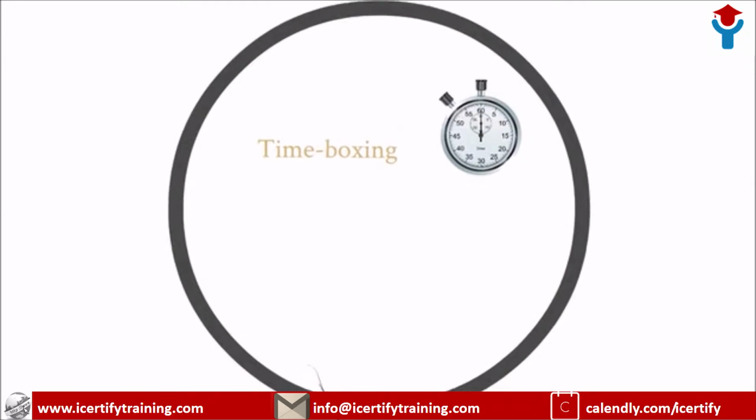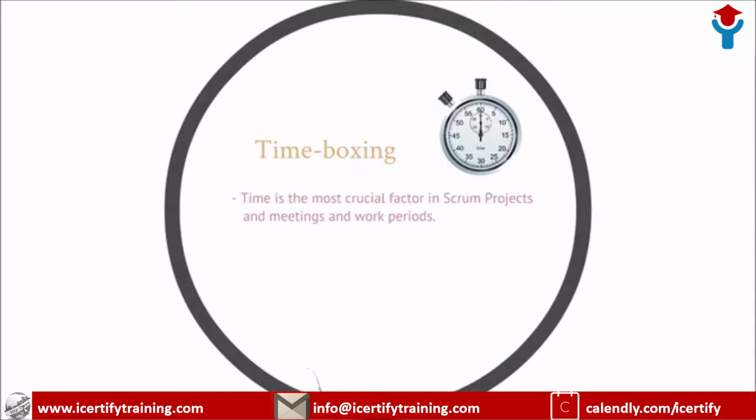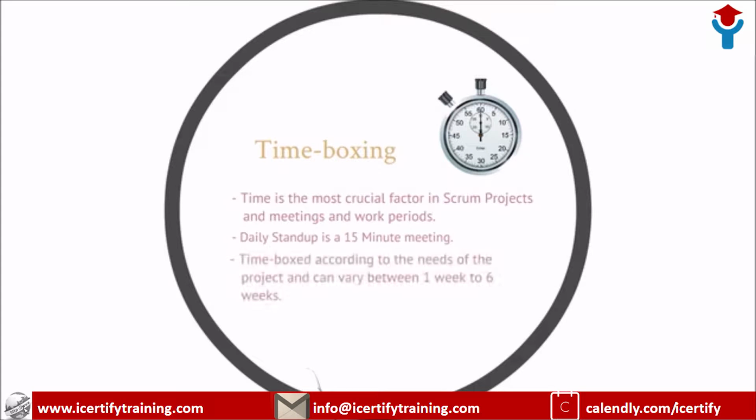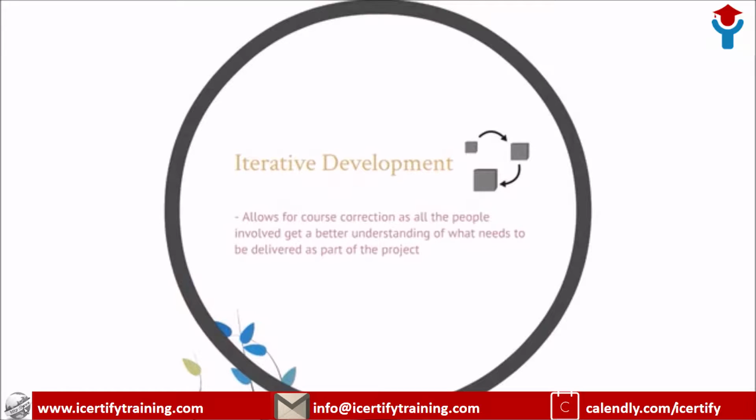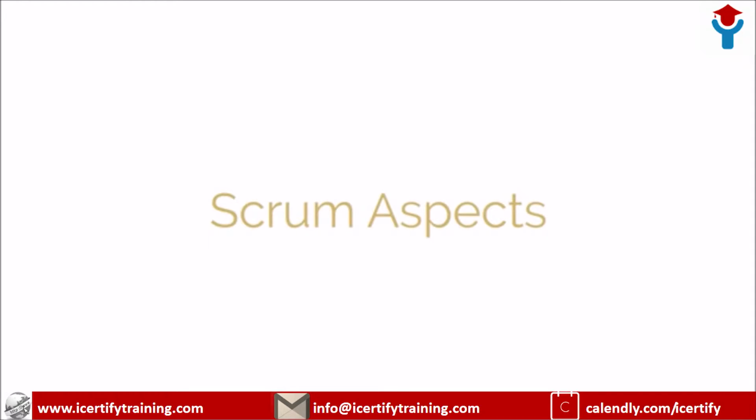The fifth principle is time boxing. Time is the most crucial factor in Scrum projects, and meetings and work periods are time boxed. The daily stand-up meeting is a 15-minute meeting. A sprint is time boxed according to the needs of the project and can vary between 1 to 6 weeks. The sixth and last principle is iterative development, which allows for course correction as all the people involved get a better understanding of what needs to be delivered as part of the project and incorporate this learning in an iterative manner. Now, let's look at the Scrum aspects.